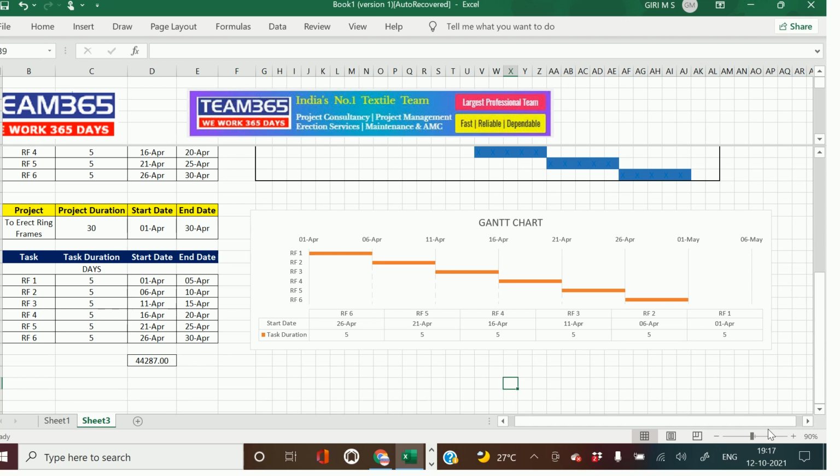You can even put the actual data by copying it and pasting it on the next sheet. First sheet can be your Gantt chart, second sheet can be your monitoring chart of the actual status, right? So in the actual status, you just go on changing the values as per what is actually happening. So you can compare both the graphs and see what's the deviation, right?